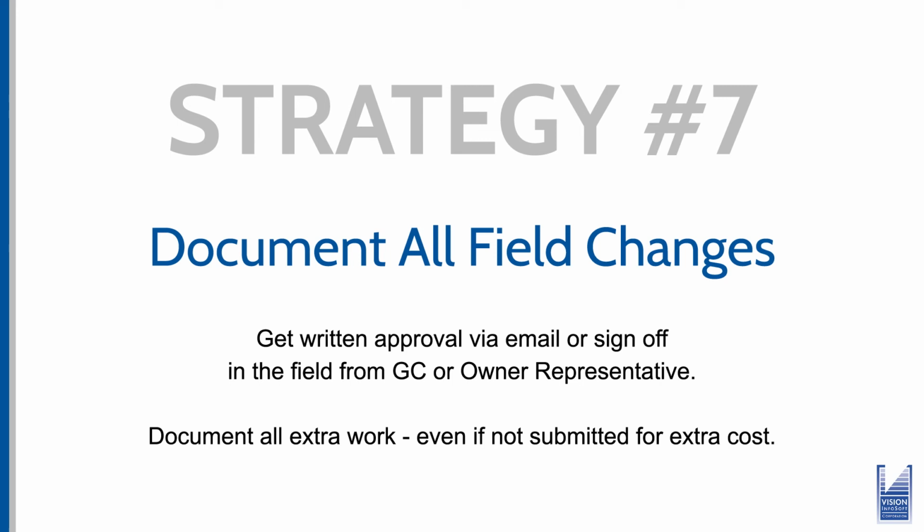Finally, and again, this is probably kind of preaching to the choir, but especially if you're the owner of the business and you're running your electricians in the field, you need them to get written approval or email sign off on any changes that are made, hopefully before they're done. Worst case is you have them sign off after they've done the work, that you've done extra work. And it's really important to document any changes, even if it's just moving an outlet from one wall to another or moving it 10 feet away. Get that documented, get it signed off. If nothing else, send an email to document it for your own system that you've done that work.